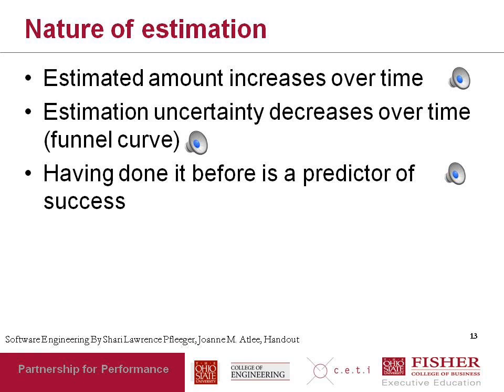And if the project runs into any unknowns, which of course these engineers don't know at the start of the project, well, these will cause increases in time. They will not cause decreases in time, because nothing that you think will be in a project ever goes away. You still have to do those. It's the new things that get added onto the project that add to the estimation, or that add to the cost and duration. So always keep this in mind. You'll rarely run into a situation where your estimation reduces over time. Almost always, your estimations will increase over time.